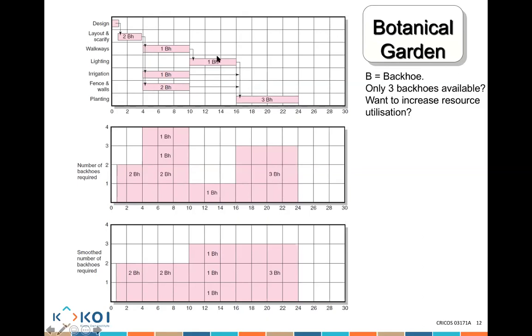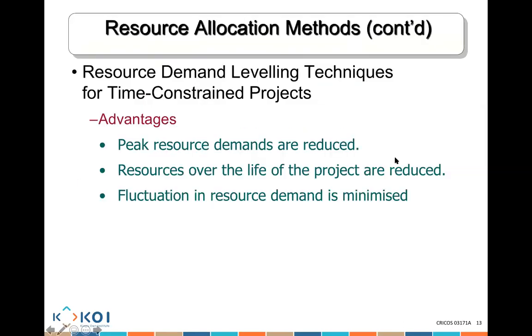Zaka, do I have any more slack left? If I push this activity 6 days and start in week 10, that's all. You see, this arrow means slack. If I push it to start here and finish here, do I have any more slack left? No. No more slack left. It will be gone. Okay? So that's what we're talking about.